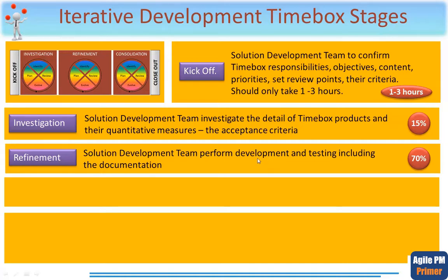And it's a good idea to start the refinement iteration step with a quick and informal planning session in order to determine which members of the team will be working on which products, and the order and sequence of such work to create the products should also be agreed. Here, factors such as the MoSCoW priorities for each product, the availability of specific resources, and any dependencies or constraints would suggest the most sensible schedule of product creation.